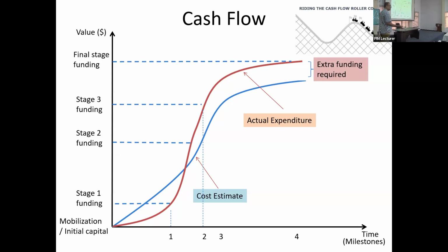Bank may say, no, we can't give you, we haven't budgeted for it. Or the bank says, we will give you, but the interest rate is so much. So you are now incurring interest much before you planned, at least 3 months before. So your project cost then starts going up.